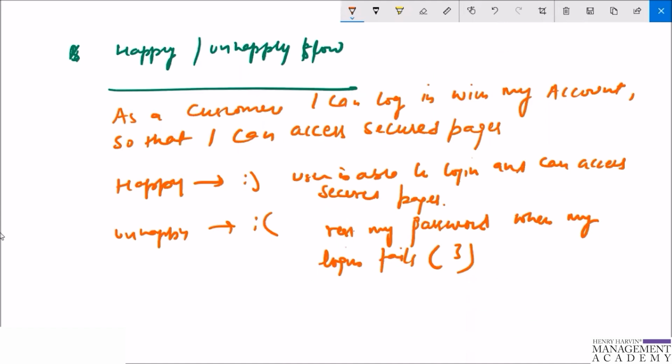So a product owner can more easily decide what is important right now. So perhaps blocking users after 3 attempts or failures is not important right now, because there is only a handful of users in the very first phase anyway. So perhaps the reset of the password can be done by sending an email to the customer care employee for the time being. Again, by splitting up functionality, we can more accurately ask questions about the business value and make the decision accordingly, right?